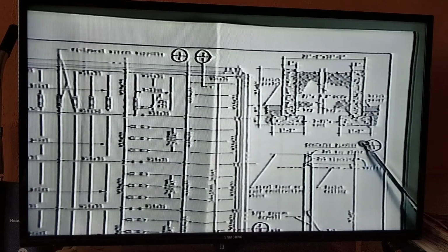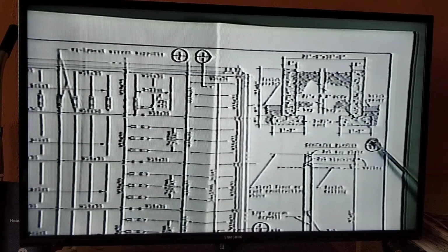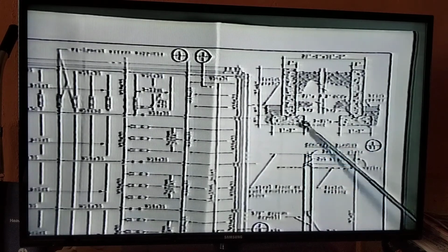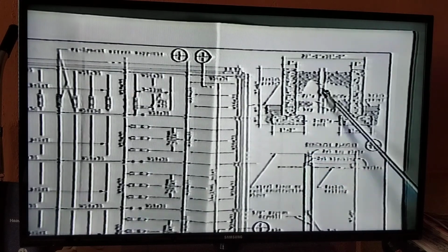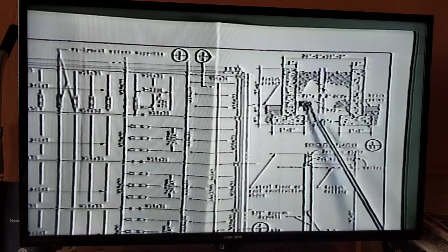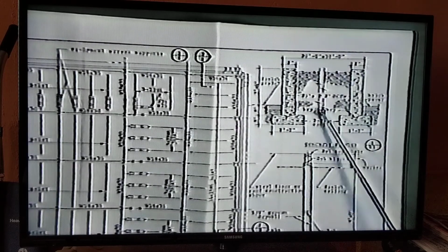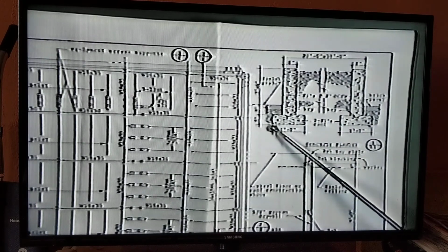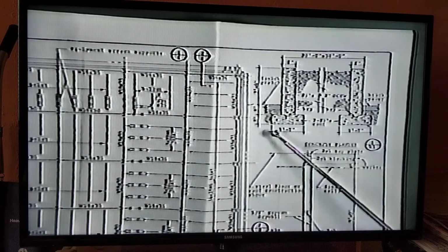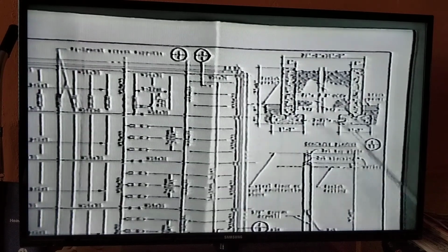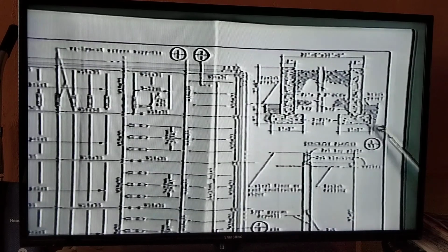We're also shown here a planter, and you want to refer to the cram workbook for this planter. There are a number of questions that can be asked about this shape, and it's an unusual shape to work with because, once again, if you were standing inside of it, you'd be surrounded on all 4 sides by walls. There's no opening here. It just appears that way because they've cut it open. And also, we might be asked about excavations underneath the footing, and what we have to remember is in all dimensions, the excavation runs to the outside edge of the footing.